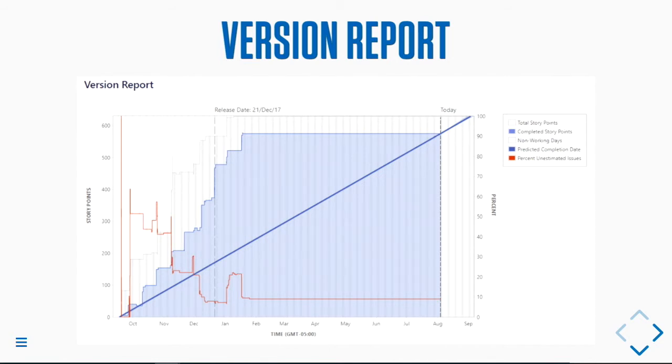But then it extrapolates out, using current, optimistic, and pessimistic rates based on current progress, to the total number of points in a release. So all of this results in an estimated date for the release. Was that a lot? That sounded like it was a lot.